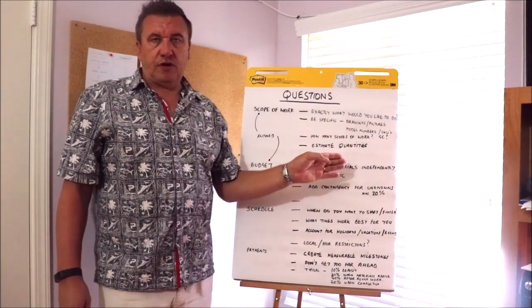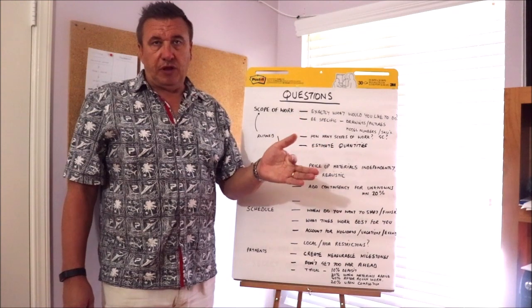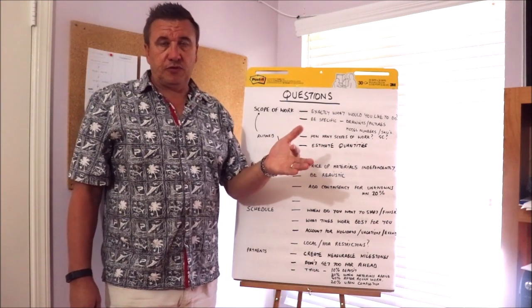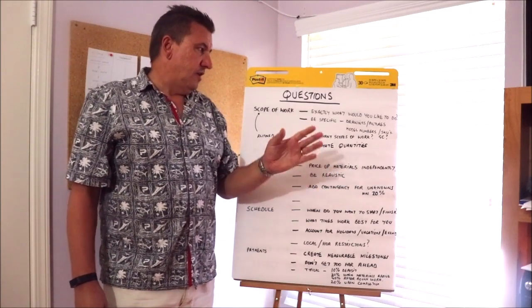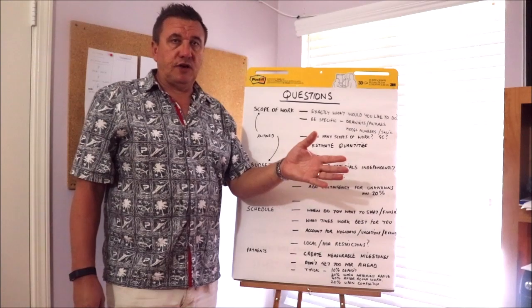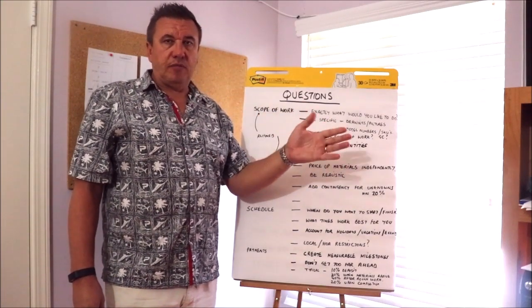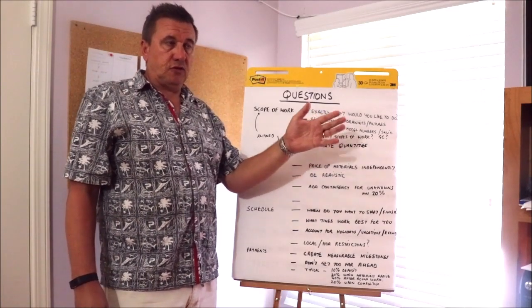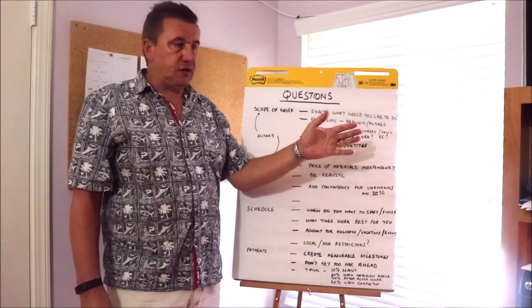How many scopes of work are there? If you have a painter and a plumber, that's 2 different scopes of work, so 2 different types of documents have to be created. If you start getting into bigger projects, you're going to want to use a general contractor. With a general contractor, he's going to mark up each of the individual subcontractors. So if you can manage 1 or 2 guys on your own, that's beneficial for you. That's going to save you some money.